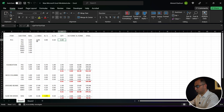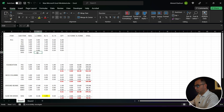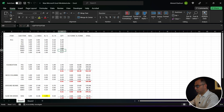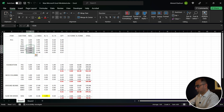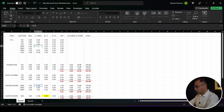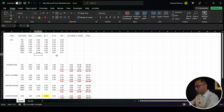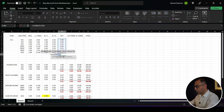The quantity will be calculated similarly to what we've done previously. I can copy this formula and use it for all of them. For the slab on grade I just need the area, and I'll put the thickness as 5 centimeters. I just need to link these formulas properly — I'll take this one, put it here, and say plus 0.2. I can use these two like this and go ahead and take an auto sum here.